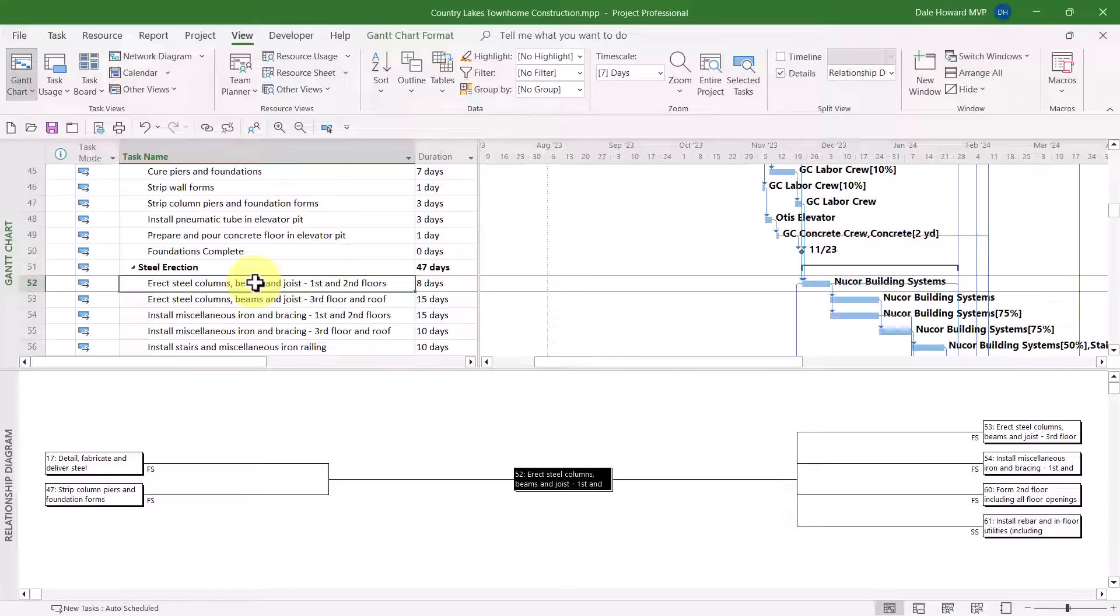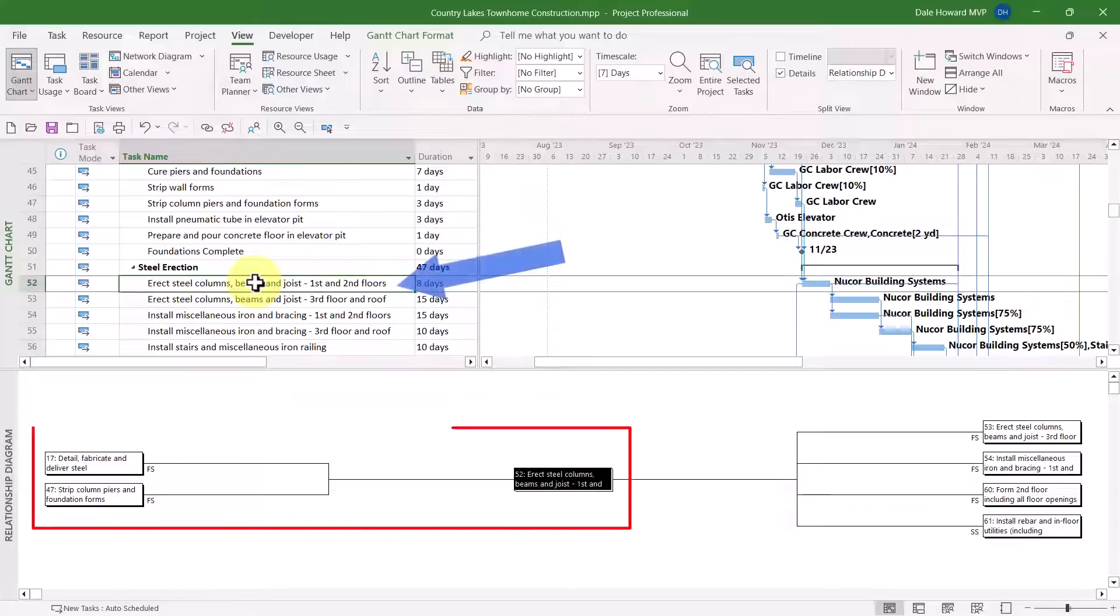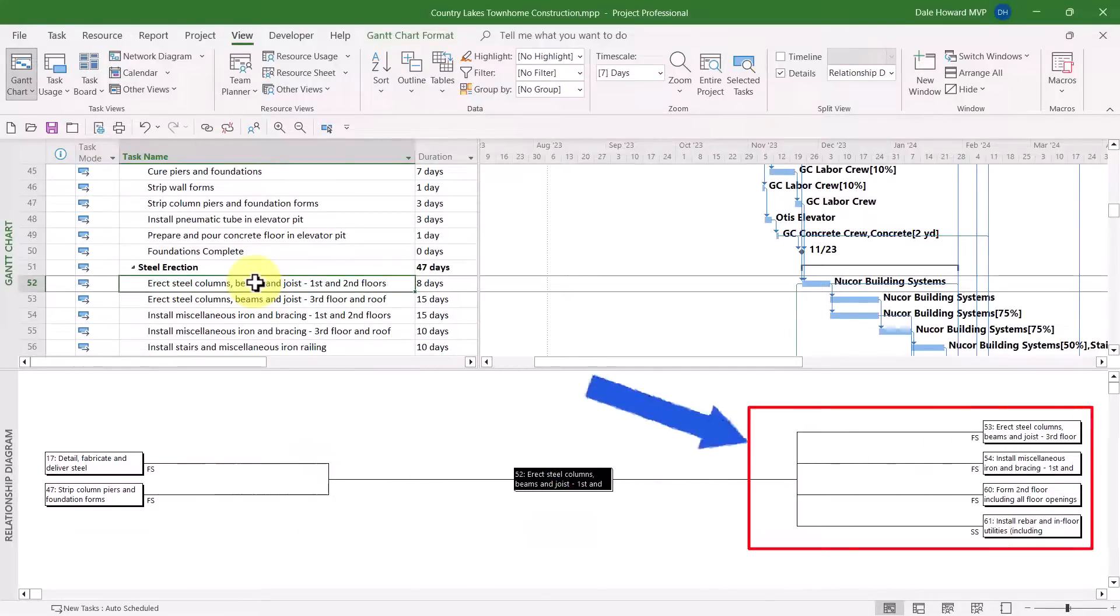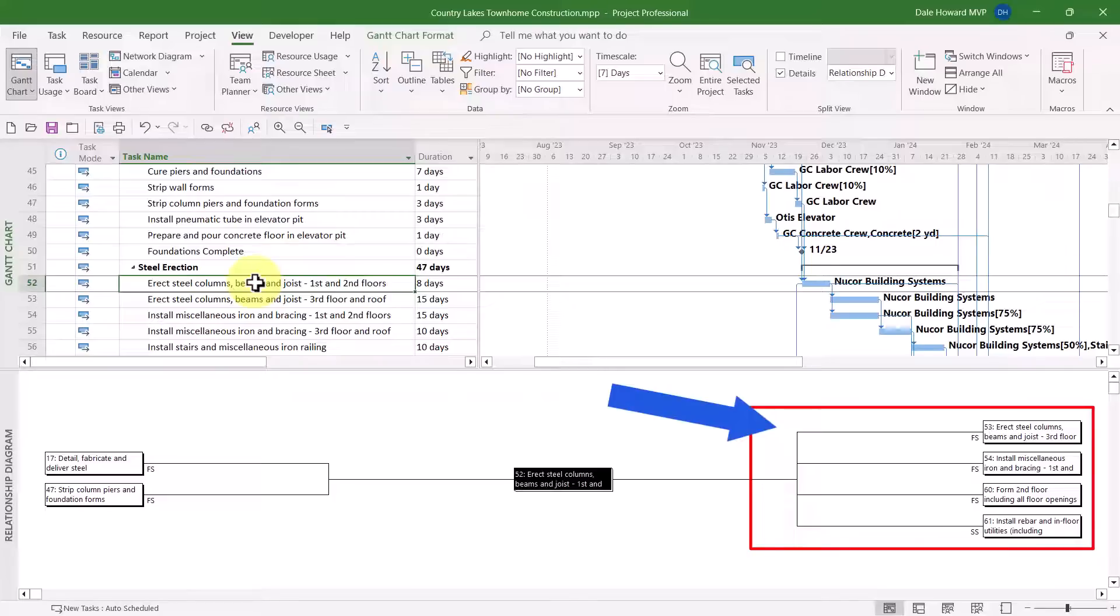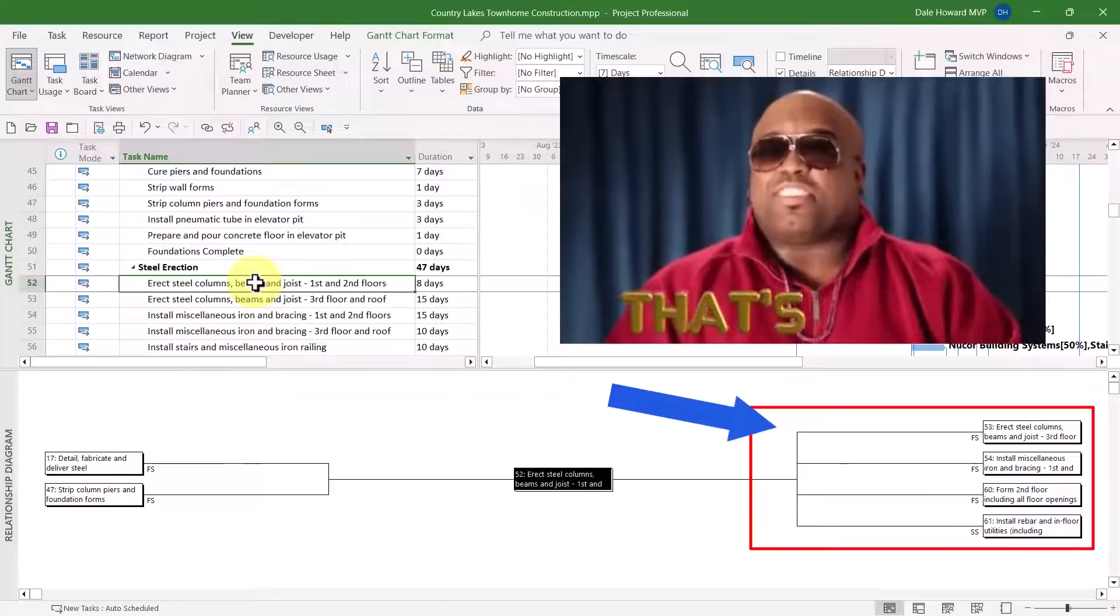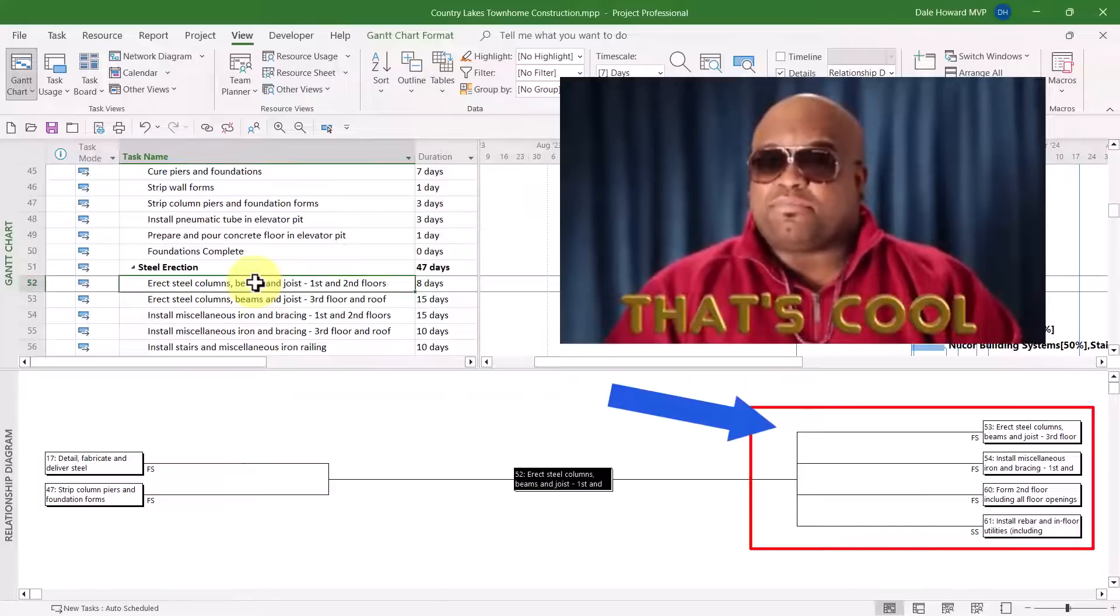Notice that task number 52 has two direct predecessors. Those are the two that are shown on the left side of the Relationship Diagram view, and this task also has four direct successors that are shown on the right side of the Relationship Diagram view. Is that cool or what?